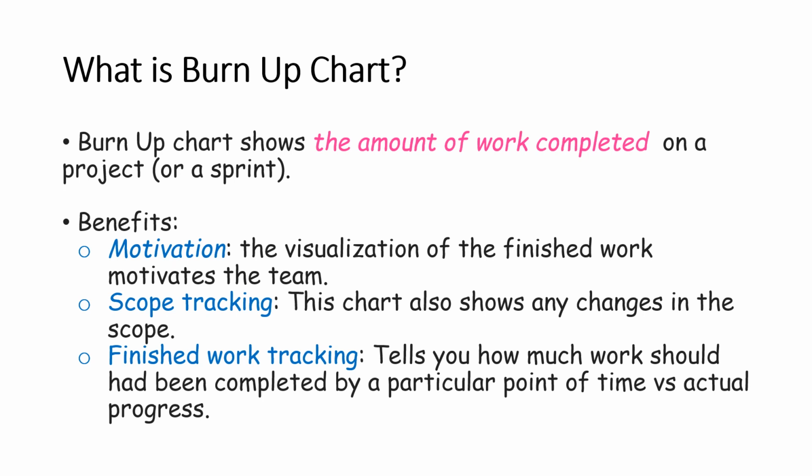The burn up chart also gives you insight into if there was any added work in the middle of the project or in the middle of the sprint. So if there was any added or reduced scope, it will tell you that as well. And finally, it helps you in tracking the amount of work which is getting finished. So at any particular point of time, you can see the actual progress versus what amount of work should have been finished by this time.